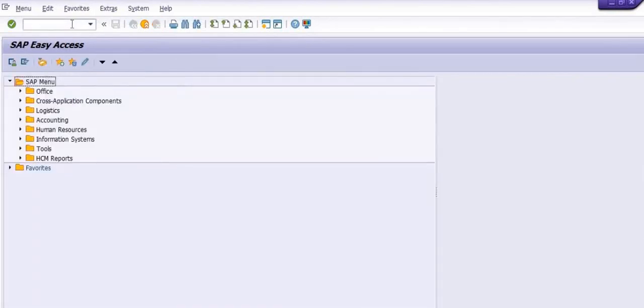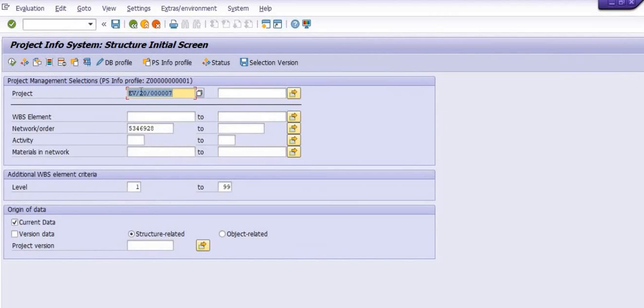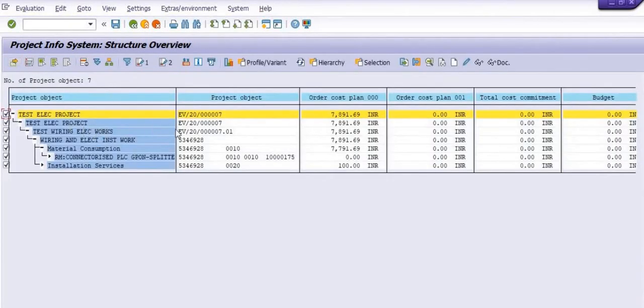So this is the whole process of WBS creation and WBS approval. And in CN41 you can check the detail of your WBS in the report format. In CN41 we have mentioned the project. See, this is our project number. This is our WBS number. We have a single network element, and in the single network element there are 2 lines. 10 line is the internal processing of the material plan which we have planned. 20 line is the service line, the services which we have planned.